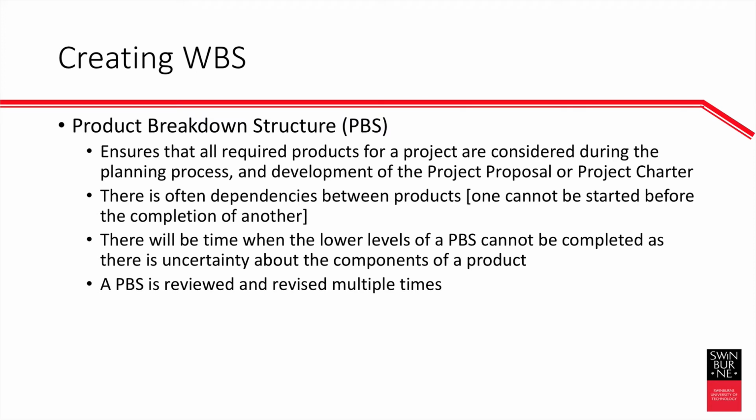There will be times when the lower levels of a product breakdown structure cannot be completed as there is uncertainty about the components. And this is where a plan-based project, waterfall project, starts to become extremely challenged. You don't necessarily know the detail right down to the nth degree, and you can't know until you're involved in it.